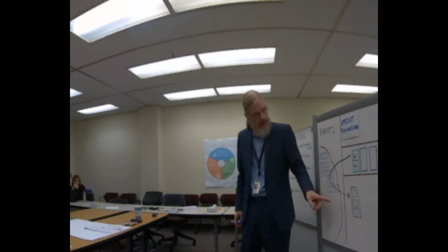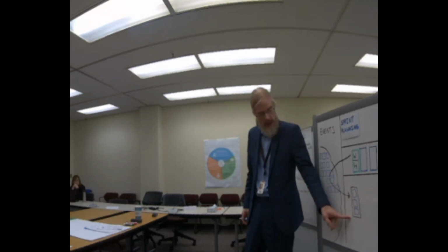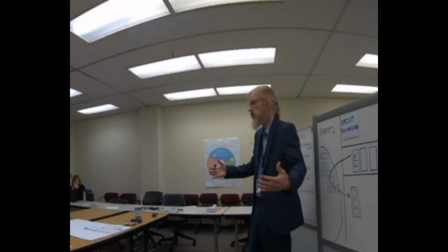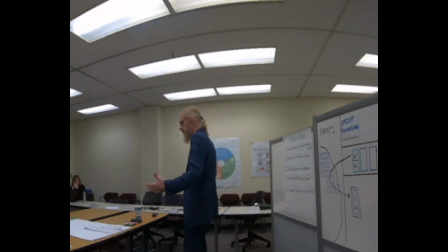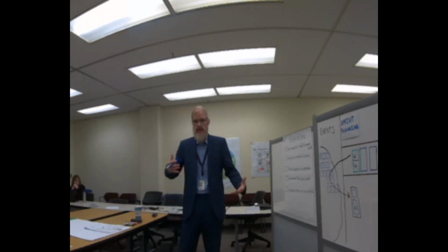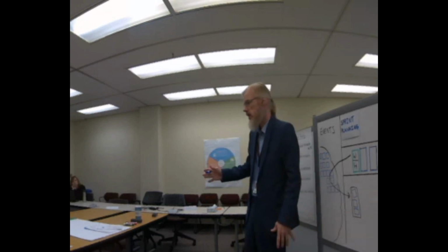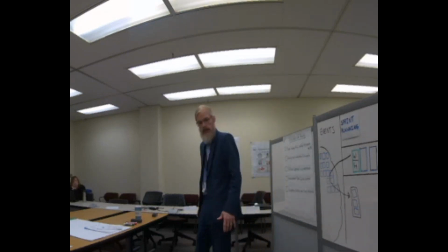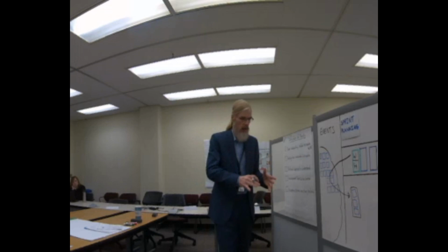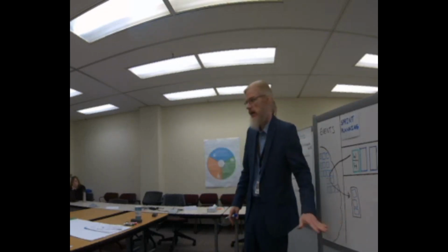But once we've determined that this meets our velocity, then we check it against capacity. We ask the question, what is our capacity this sprint? Is it any different than last sprint? Is somebody going to be on vacation? So that's kind of how we do that. We'll talk about that a little bit more in the slides. But I just want you to get that sense that we go through one by one, we keep filling this up until we hit our capacity.